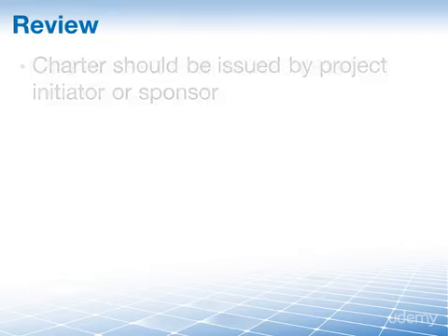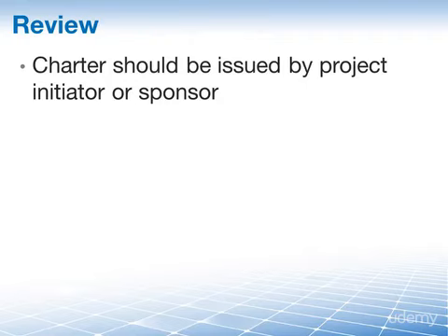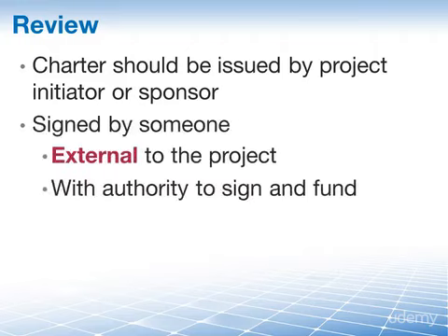Let's review. The project charter should be issued by the project initiator or sponsor. Often the charter is created by the two organizations involved in the project, those who request the project and those who execute the project. The charter, however, is signed by someone who is external to the project, and at the same time this person has both the authority to sign and fund the project.